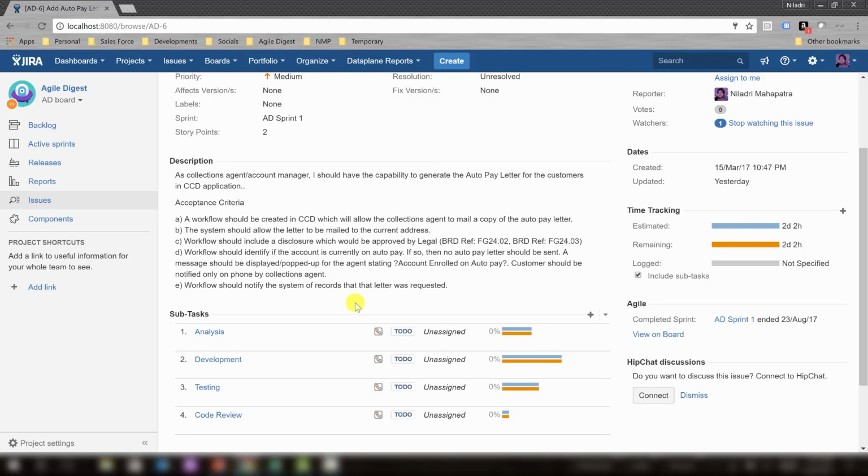you will get better visibility of the entire work, and the Scrum Master does not necessarily need to create all the tasks; everyone can create their own tasks. They just need to write down somewhere what story and what task they are committing to at the time of sprint planning. This task will again be updated in our tracker, to see how our capacity is going.